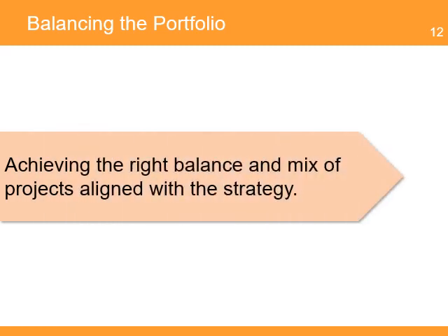The portfolio manager plays a key role in project prioritization, making sure there is a balance of components and that they all align with strategic goals. This analysis ensures that the portfolio has the right balance and mix of projects. The portfolio's balance in dimensions can range from risk levels, time to completion, and strategic objectives. As changes occur from new portfolio components or changes in the organizational strategy, the portfolio manager is responsible to analyze the impact of the changes in the portfolio and recommend actions to balance it.